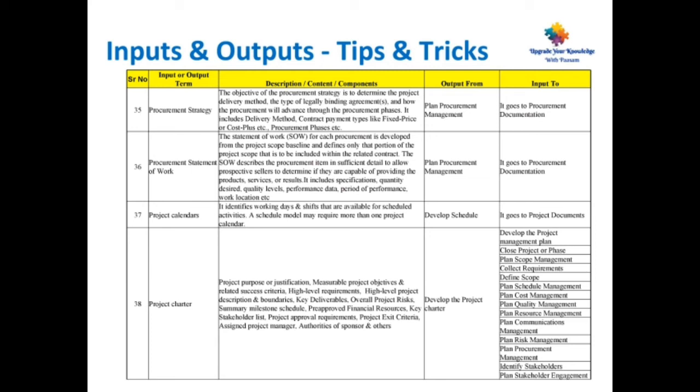the project charter. This is the output from develop project charter, and it goes as the input to various processes like develop project management plan, close project, plan scope management, collect requirements, define scope. This is basically used in the planning phase and also in the close project phase.